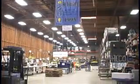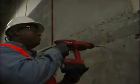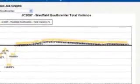Traditionally, project defects are discovered at the end of the job, when the solution is very expensive and has the highest impact to the overall project. With the help of JPAC, Holmes has early visibility to potential problems, and as a result, they are better equipped to react and respond with the least amount of consequence to schedule, to cost, and to other trades.